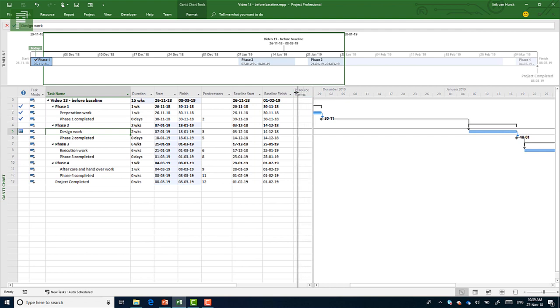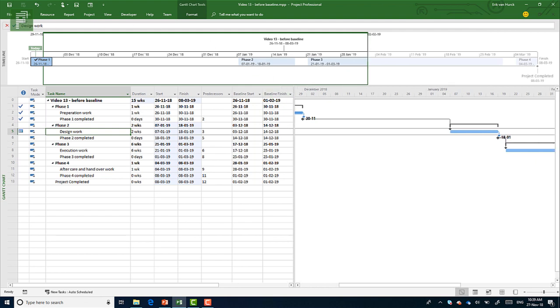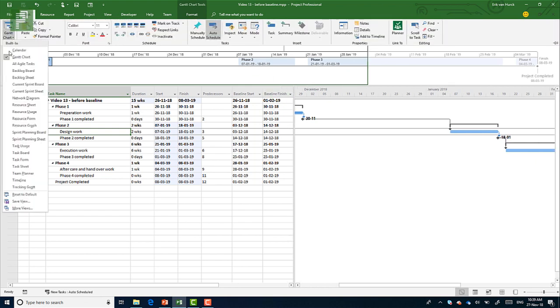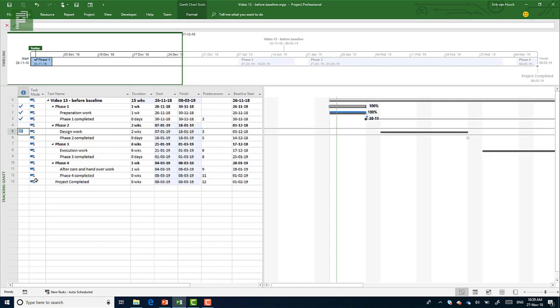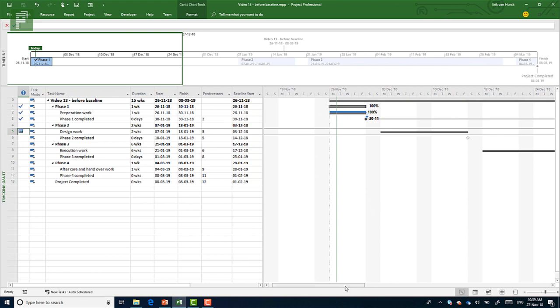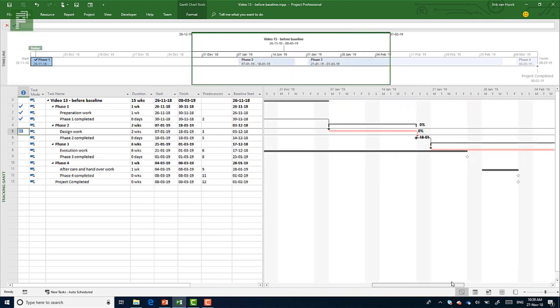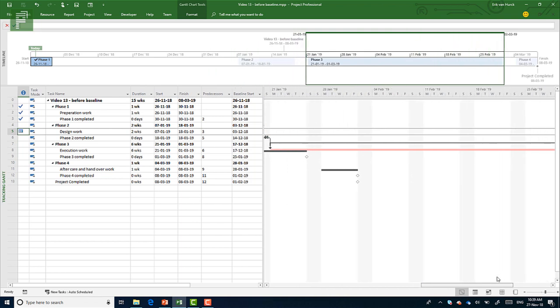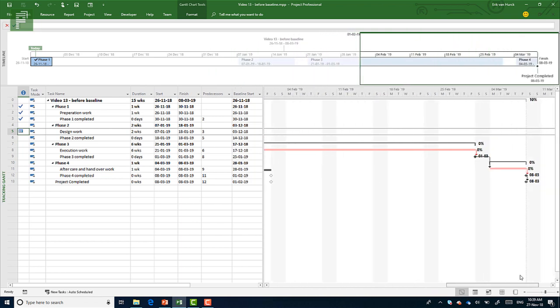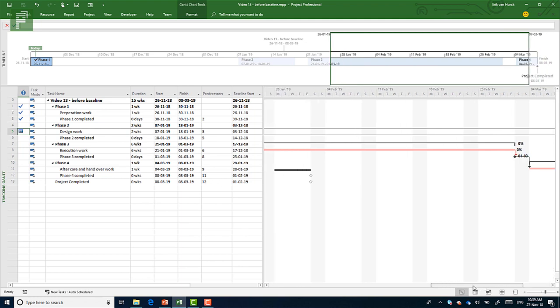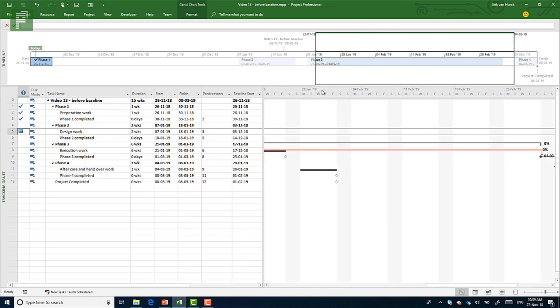And moving in again to the tracking Gantt, you will see that the original schedule started here and the baseline is equal to the actual schedule. And our new schedule ends in March, where our original schedule would have ended in January.